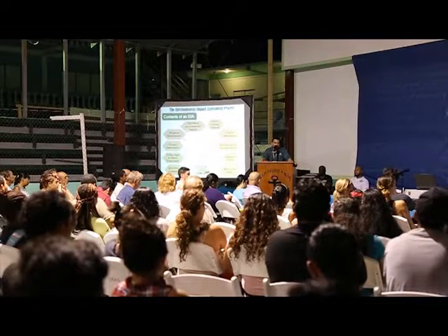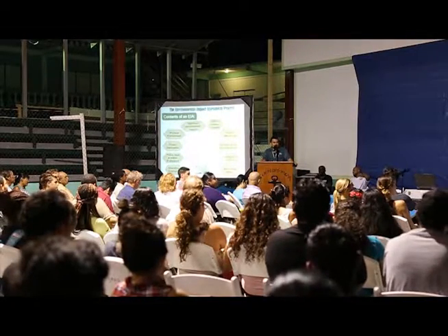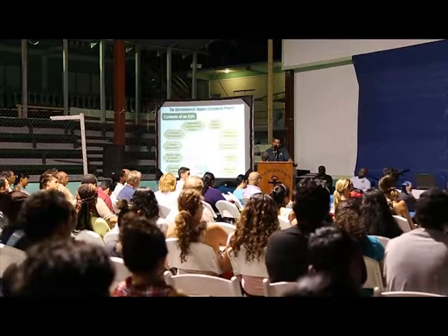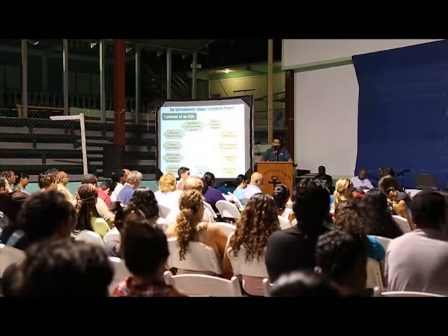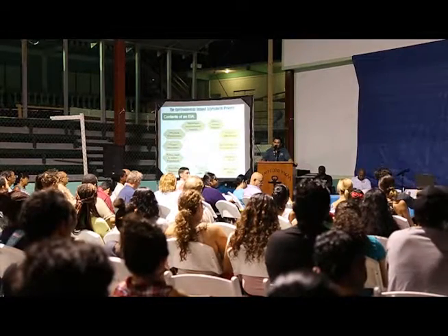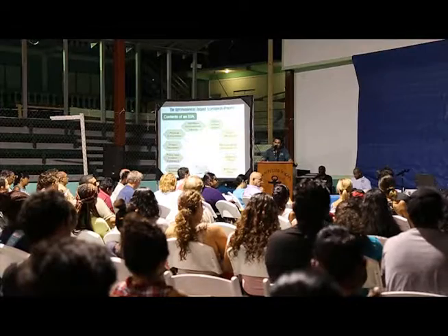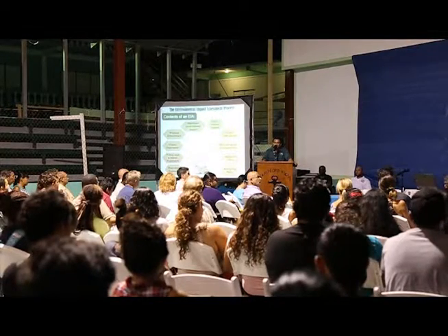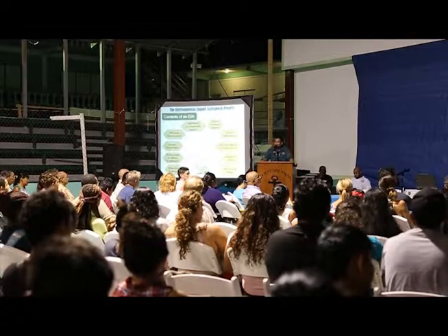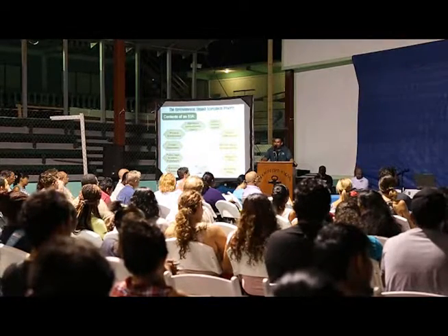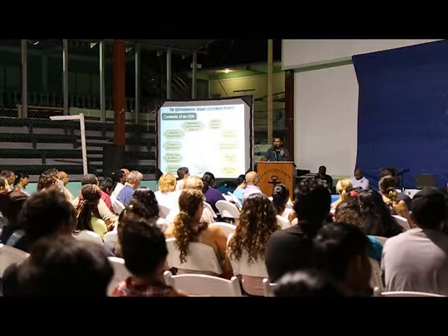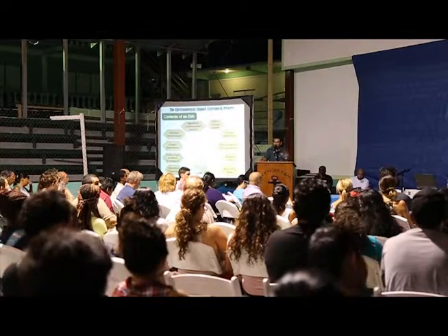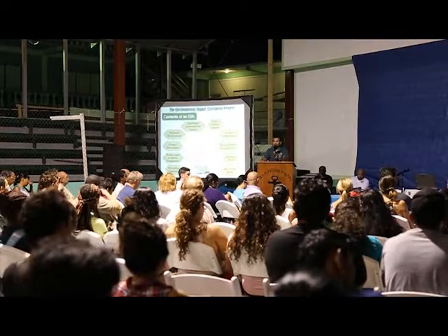Like I mentioned, it addresses the environmental consequences. It also requires that once you've identified the potential impacts and the mitigation measures, based on those mitigation measures, you develop monitoring plans to address the measures that you're putting in place, to ensure that they are having the effect that was intended, that they are addressing the issue that was identified, again, to prevent or mitigate or reduce those potential impacts.